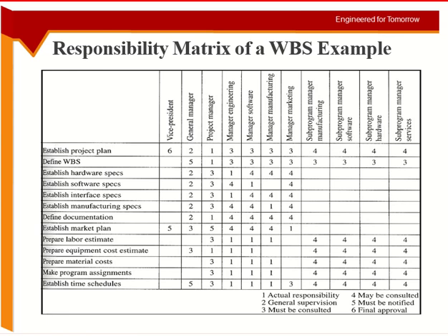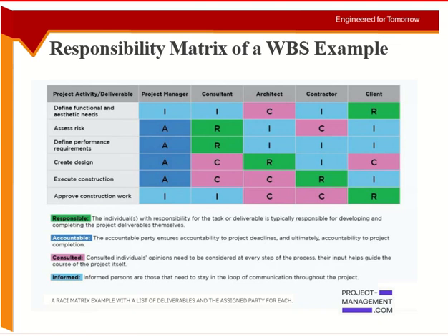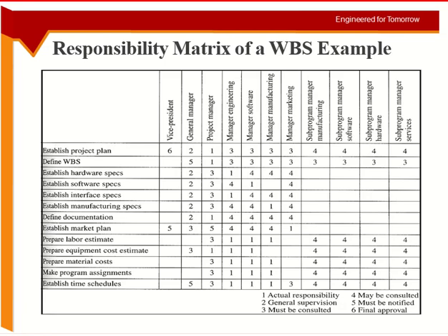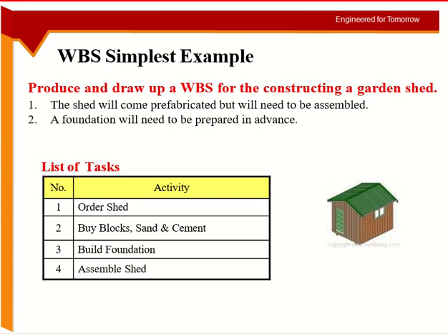If you have seen, in the first and the last activities of this chart as well as this one, you don't see the notification. So the first and the last activities are always unique. Notification from who? There's no notification needed now. The project has just started, so who to notify at this stage? So these are things you can take as guidelines from here.